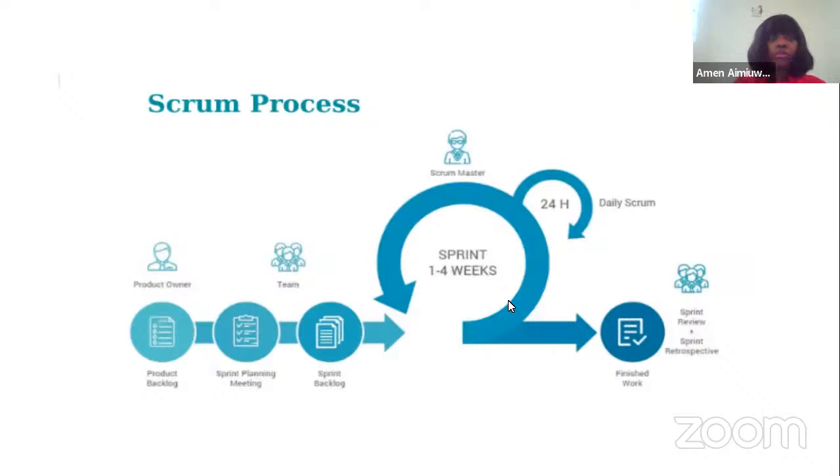So now I want to further explain all I've said earlier, so you further understand what happens in the Scrum team. During the Scrum process, the first event is to create the product backlog, which is done by the product owner. The product owner creates the product backlog and makes sure it is transparent and visible enough for the team members to understand. So the development team takes items from the product backlog and adds them to the sprint backlog. During the daily Scrum, the developers decide which particular product backlog item to work on for a particular day. And after that, the sprint backlog is created.